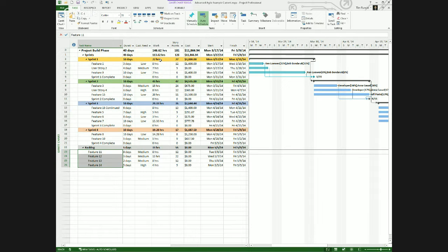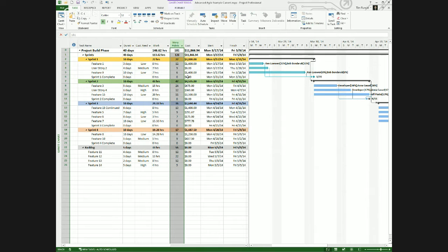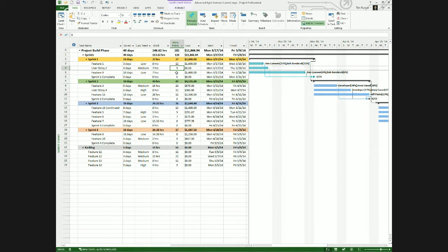Again, commonly, from a planning perspective, you'll hear a best practice is that you estimate with a duration and you ask the level of effort and work. But in some cases, if you're doing work that's never been done before, it becomes very difficult to understand how to estimate. And sometimes technical teams really struggle with this. And so you're going to hear the term story points. Here I've added a number field called story points, and it allows the team to sit down and estimate the complexity factor.